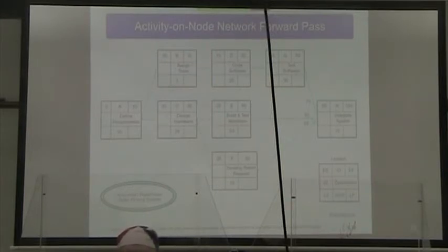For C, design hardware, it's 10 plus 25, which is 35 for our early finish time. That carries on through D, which has an early start of 15 plus 20 is 35, which means G takes that 35 as its early start time.